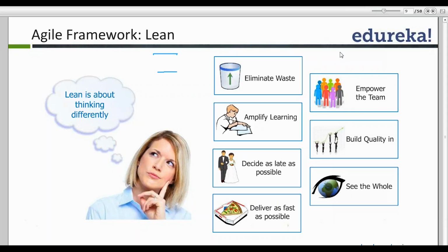The last responsible moment is the point in time up to which you have multiple choices available. Once you reach the last responsible moment, you have to take a decision on whether you'll go with solution A, solution B, or solution C. As a project manager, I decide as late as is possible without impacting the quality of the decision.